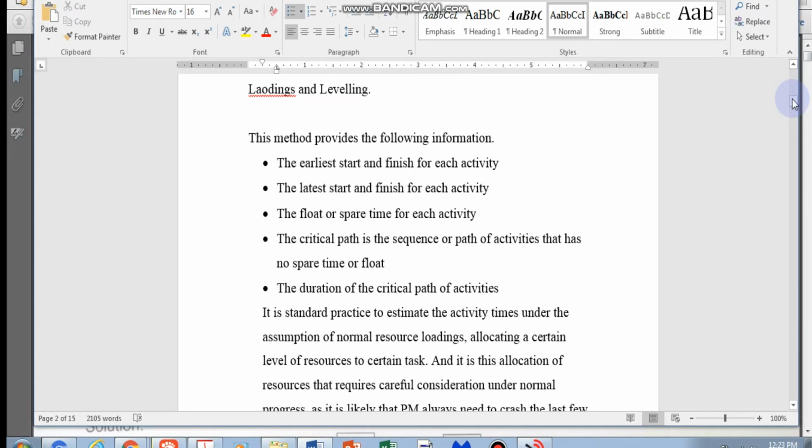So there are two parts here. One is that you understand the float time and spare time available for each activity and the overall project. Then you will know how to play with the resources more effectively when doing multiple project planning. And by understanding that activities without float time or spare time are on the critical path, you may have to pay special attention to them, and also put more resources to them should there be a problem with those activities.